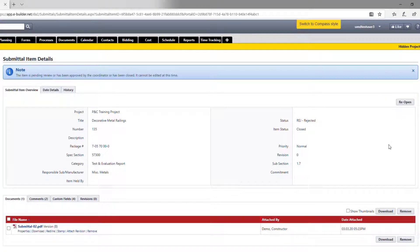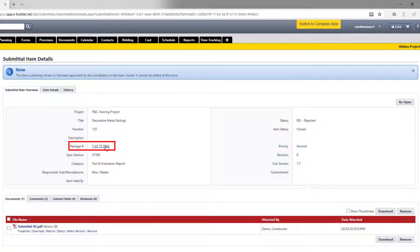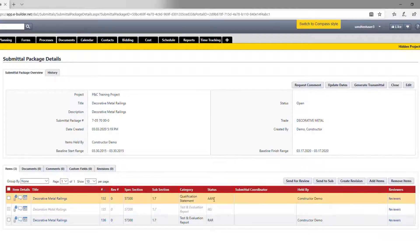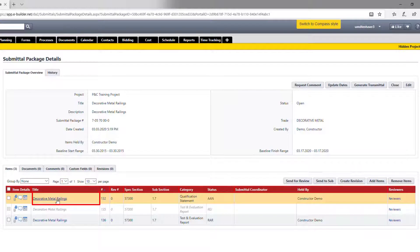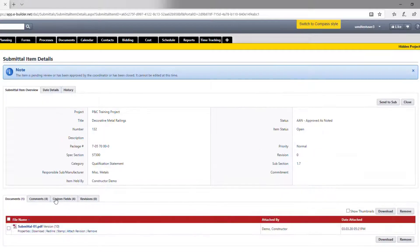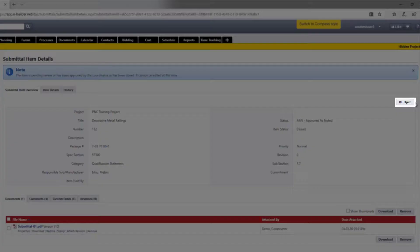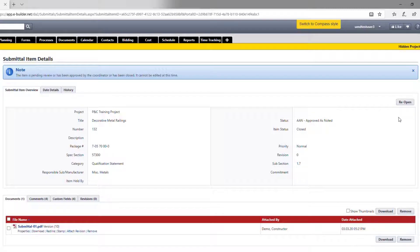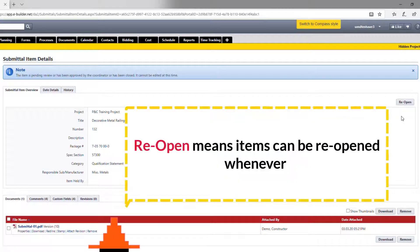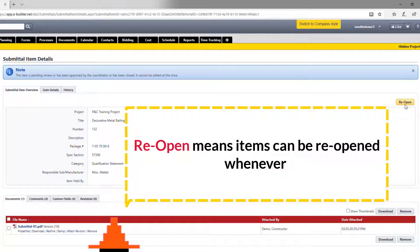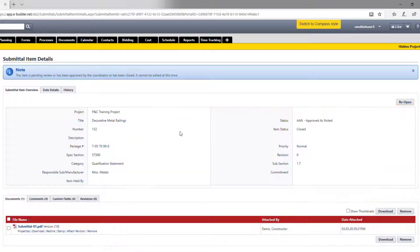When things are clear, click on the item that needs to be closed, go to the submittal item level, and hit close. As soon as the item is closed, this button turns into reopen, which means you can change your mind at any time and always come back here and reopen the item.